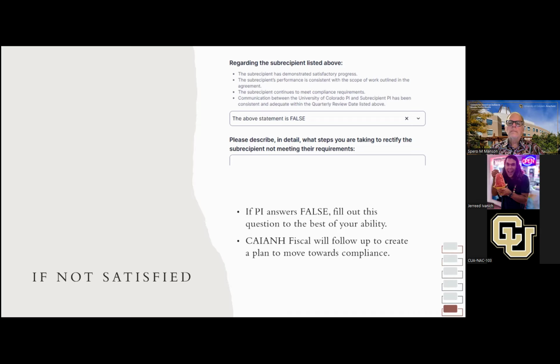Well, I can see where it would work almost better if they're set up to get paid by meeting certain deliverables. Well, in my experience, Jen, can you hear me okay? Yeah. It is sort of a mixed bag. First off, paying by deliverables requires really close attention and greater intensity of effort to monitor, but it has the great advantage of incentivizing and rewarding completion in a timely fashion.